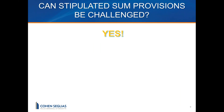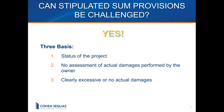Can stipulated sum provisions be challenged? Yes, absolutely. There are three bases that come up very often in construction. The first is the status of the project — specifically whether completion is substantial or not. The second is that the owner never actually assessed its actual damages, so the liquidated damage amount is not a reasonable forecast using the language from the Wasserman case. And the third is that the LD provision is just clearly excessive, or there are no actual damages — in which case the courts will also not enforce it.